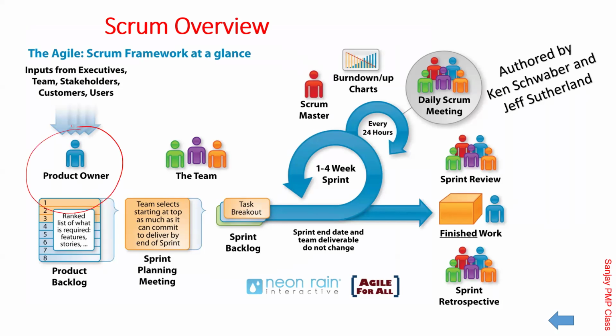Remember, the product owner is going to capture the requirements and prioritize them. The team is going to decide what they want to take in the given time. They will negotiate with the product owner and then finally decide. No one has a right to dictate terms to the team, saying you must take so much load. No, he can give the priority. You need to decide as a team which part you want to take, how much you want to take onto the plate. And in this transition, there is something called backlog refinement or backlog grooming, which means the requirements captured in the product backlog could be at a shallow level, or in wording which the product owner understands, because he's from the business. He's not a technical guy.